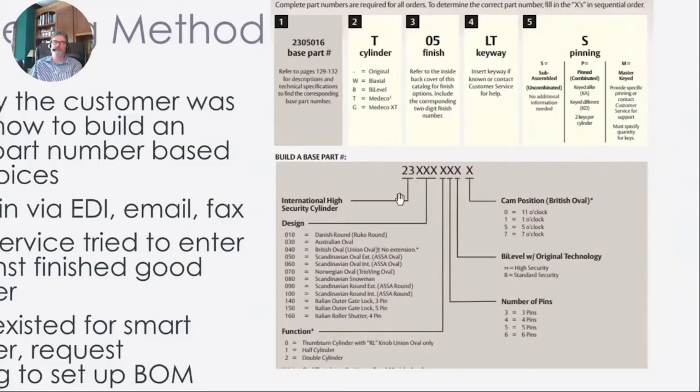However, when we first started the project, the scope, the project charter, was to not implement the JD Edwards Configurator. The original plan was to not disrupt the business by implementing the configurator and making this big change in how they went about placing an order for the product. We didn't want to go through the change management impact internally, and particularly with the customers, because their existing customers already knew how to do this.